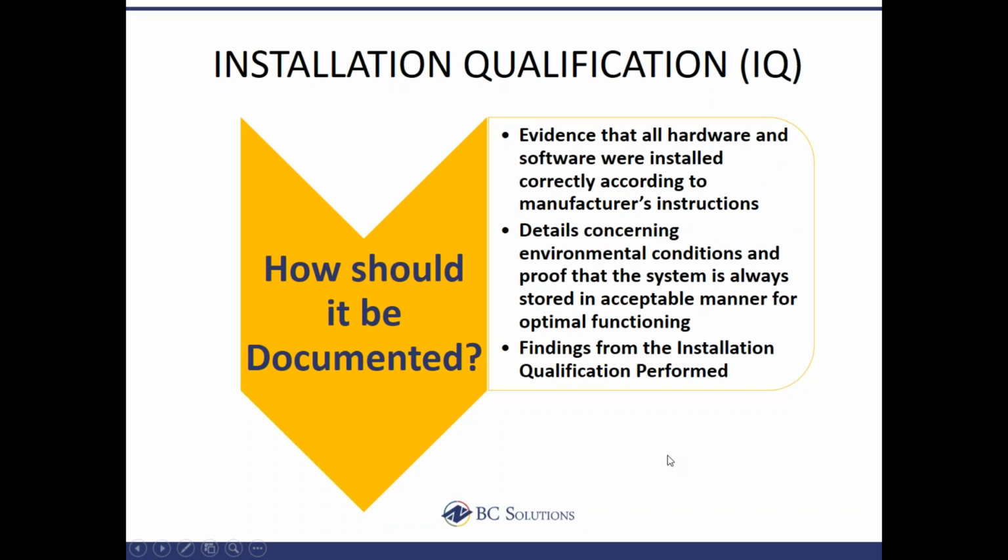And how should it be documented? The evidence that it's been done is a little bit different. It's certainly not as thorough as what we do with OQ validation, but there should be evidence that all the hardware and software were installed correctly according to the manufacturer's instructions. Any details concerning any environmental conditions. For instance, it must be done in refrigeration.